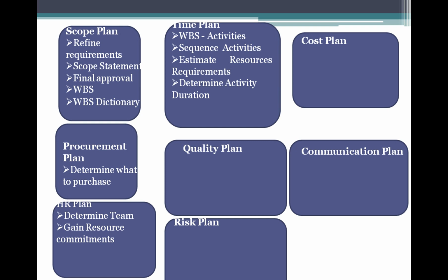For this, he has the requirements of each activity, and he gets the past history of related projects from the PMO. He goes through those past projects, how the activity estimates were done, and what organizational assets we have to estimate the activity duration. Some organizations might have estimating software, and if so, he uses that to estimate the activity duration.